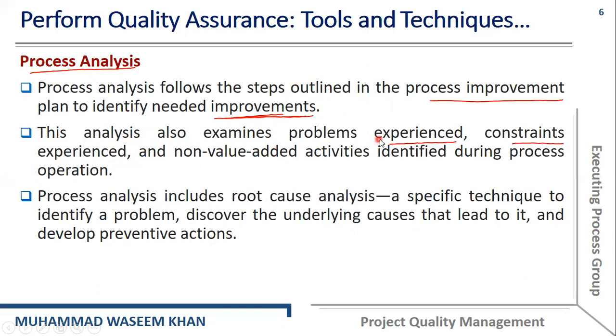This analysis also examines problems experienced, constraints experienced, and non-value added activities identified during the process operations. Process analysis includes the root cause analysis, a specific technique to identify a problem, discover the underlying causes that lead to it, and develop the preventive actions.